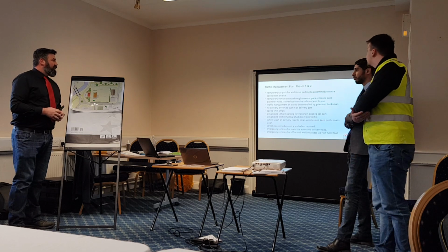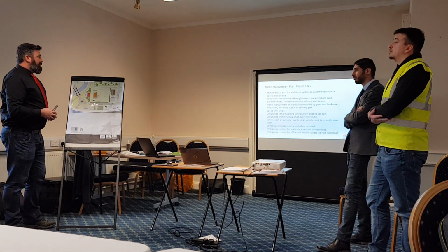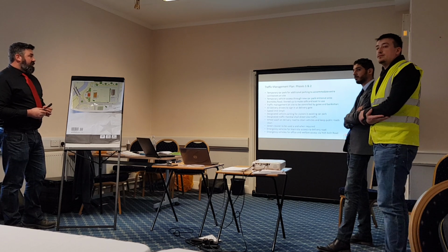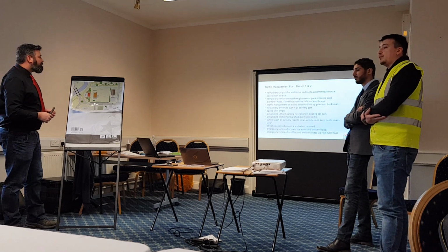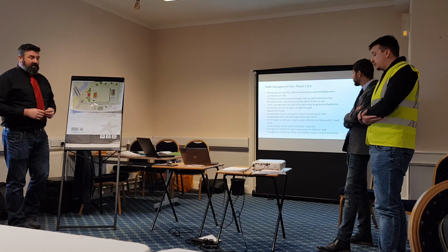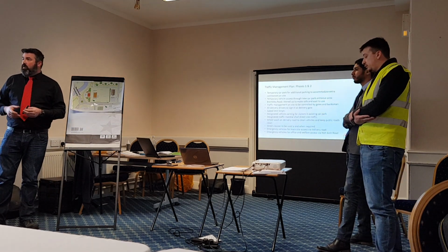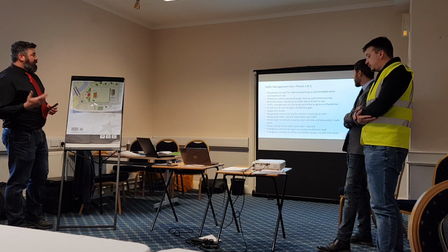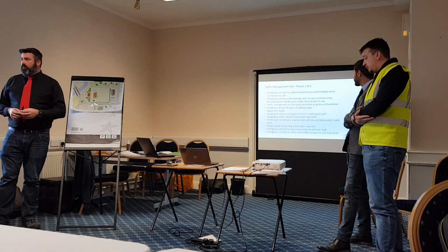There's a 5 mile/h speed limit on site to be maintained. Designated vehicle parking for visitors as well, and this will be cordoned off. Designated traffic marshals to direct the traffic. Because we've got wagons coming in and leaving site, we'll have a wheel wash on site, and that will hopefully keep the roads clean. If there is an issue with cleaning the roads, then street cleaning will be deployed as well.